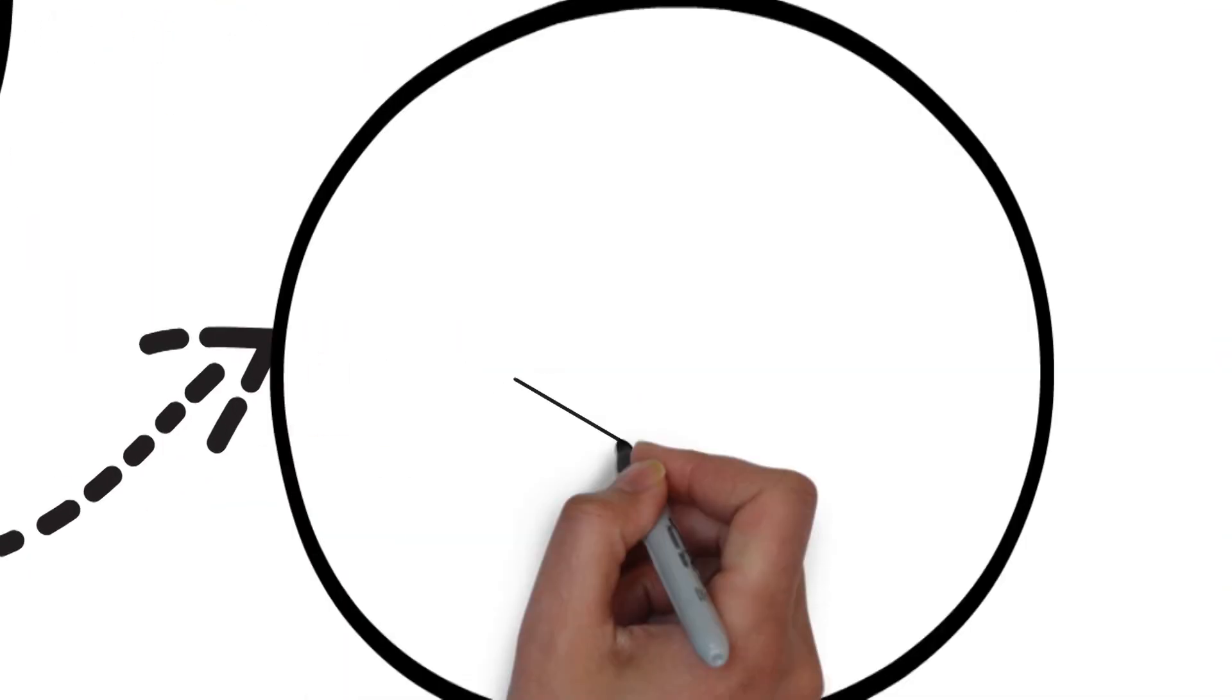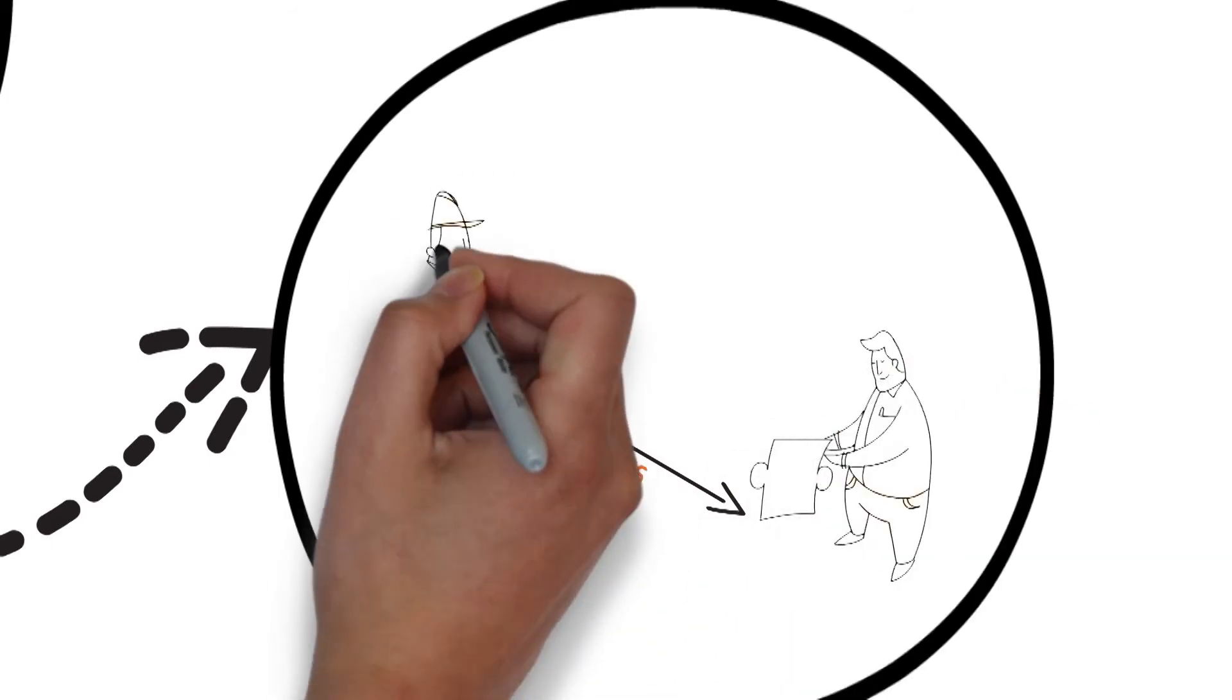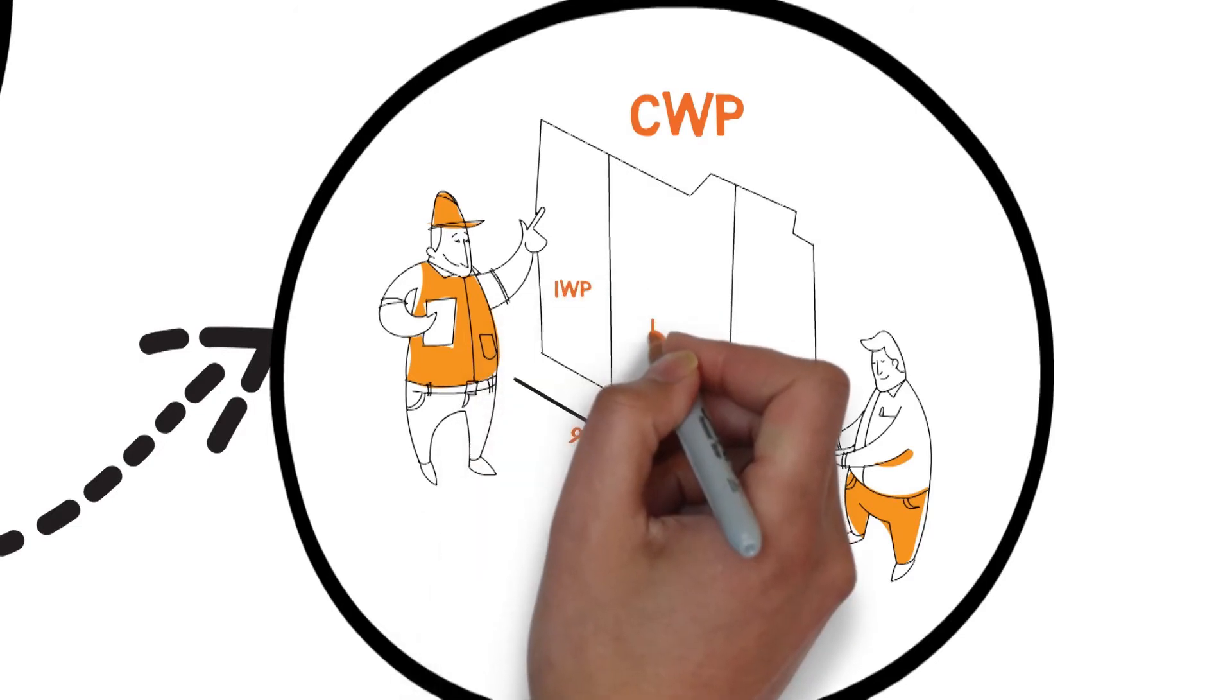As each CWP enters the 90-day window, the superintendent and work face planner refine the scope and create an outline for the development of installation work packages based upon the superintendent's execution strategy.